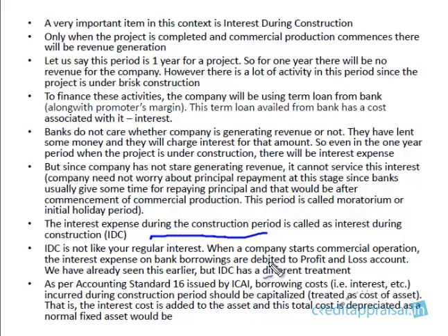So the actual treatment might be a bit advanced to you, but if you're all right with it, please understand that it's going to be added to the cost. It is going to be capitalized. That is, it is going to be added to the cost of the asset and then it will be depreciated as a normal fixed asset, right? It will be depreciated thereon.